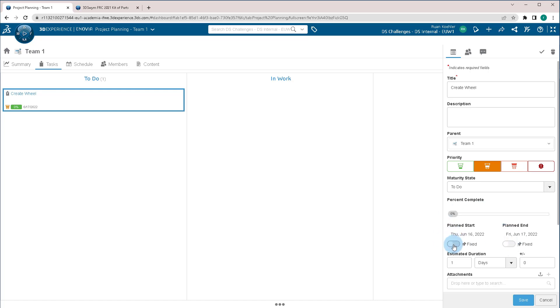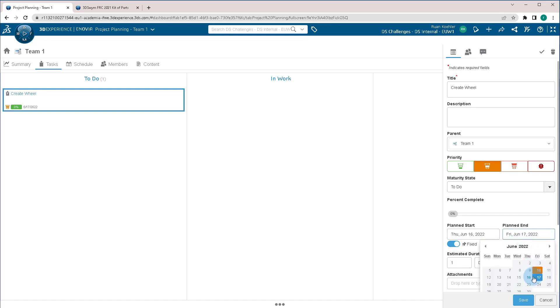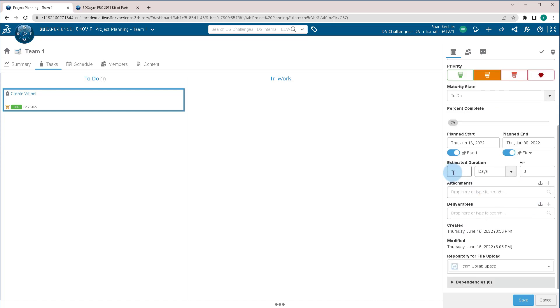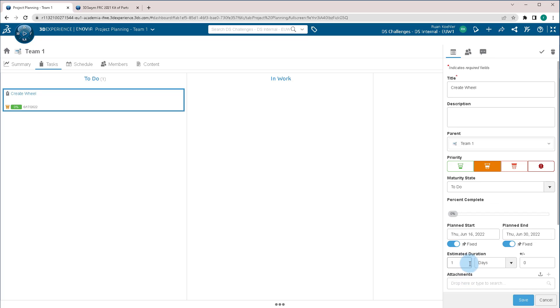Plan Start Date, many times you want to fix it. In this case, let's say we're starting today, and let's say we want this done by the end of the month. If you add an estimated duration, it'll automatically override the due date and put that in there. You're also able to add attachments here, as well as deliverables. Once you've completed all this, you can click Save, and this will update the task.